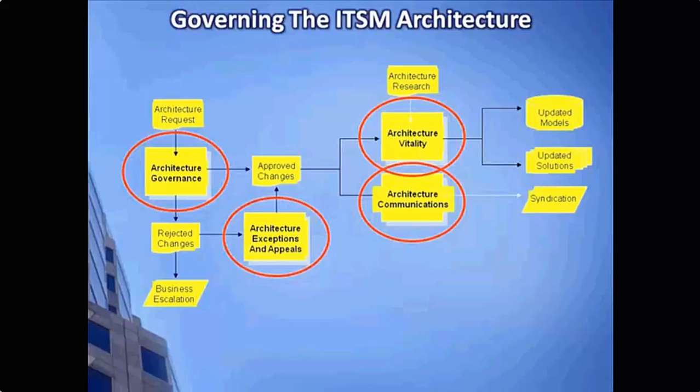And the reason for that is because as you go through your implementation effort, over time people will be consistently asking for changes, increases in scope, why don't you do a process this way versus that way. This will all start to happen literally from day one. Rather than simply tell those people to go away that you're too busy trying to implement, it's good to have a process in place where as people bring these things up, they can formally present what they're proposing as a change, and you now have a place to catch it and process it and determine whether it should truly be